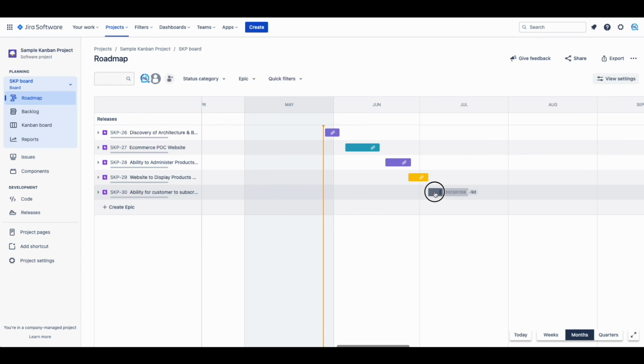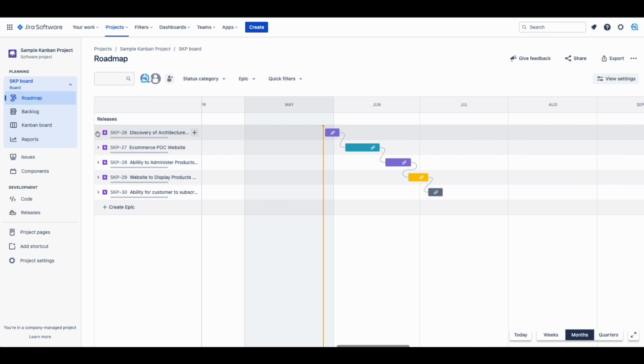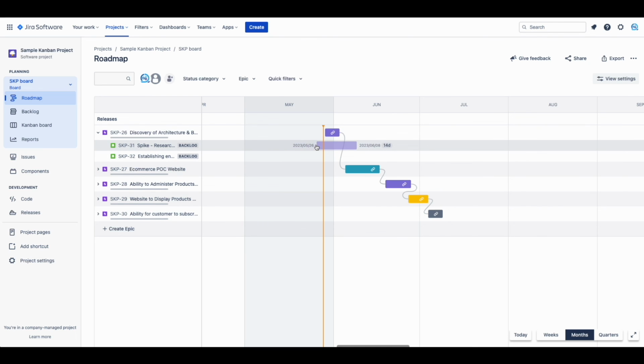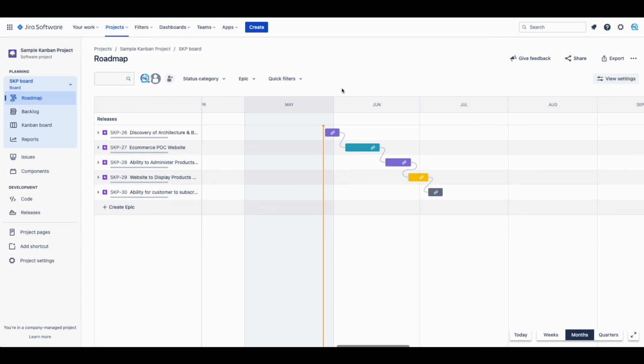If you would like, you can mark dependencies in this roadmap view at the user story level as well to match the dependencies highlighted in Miro. Now we have a live roadmap that allows us to monitor our execution towards our epics. This roadmap should be reviewed with the entire team weekly to monitor progress towards our MVP. In the next session, we will look at how to track our milestones as well.